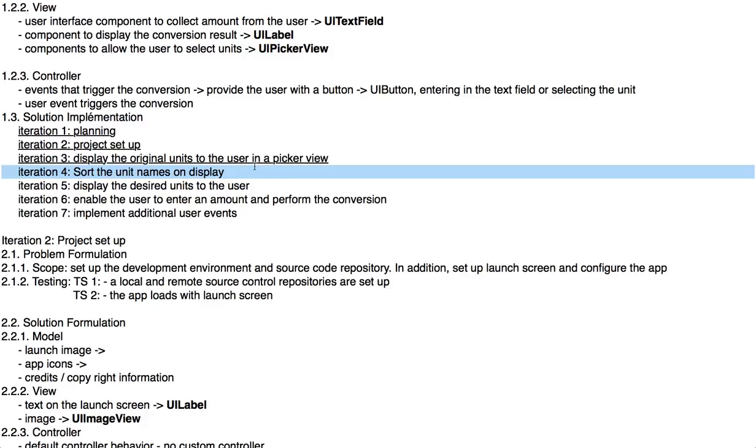So two things to point out. One, you should be aware of what they call scope creep, that every time you do something, you think of something else, and the project, instead of becoming a 2 weeks project, becomes a 4 week, a 5 week, a 6 week. Or if you're working with a client, that every time you show the client something, they add another feature. So that's called the scope creep, that the scope keeps changing and you end up losing because you're not controlling the scope. So that's on one end.